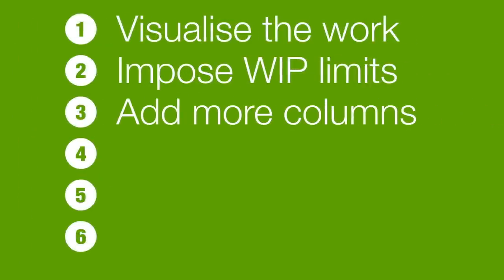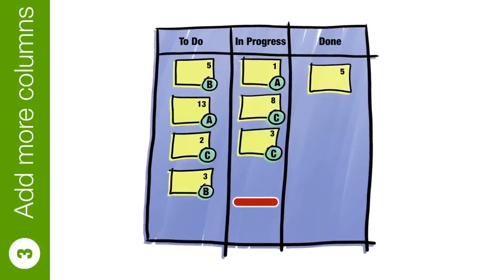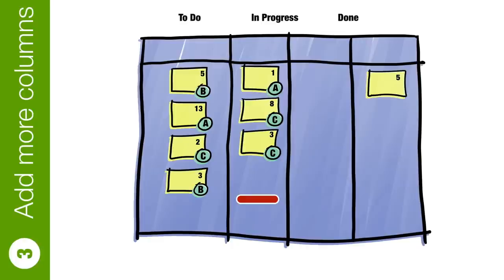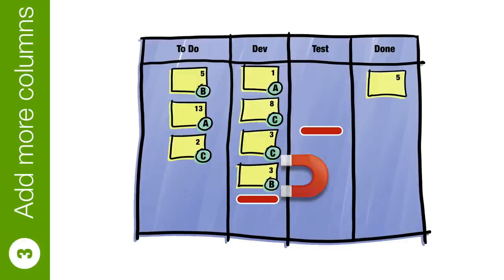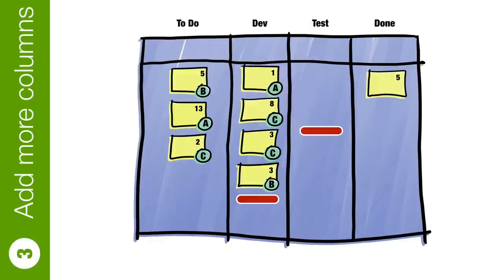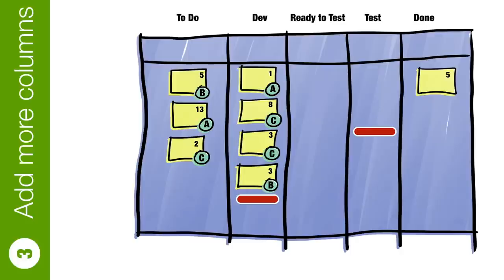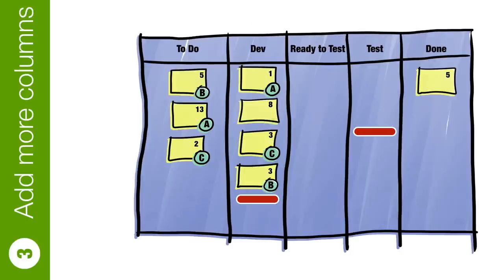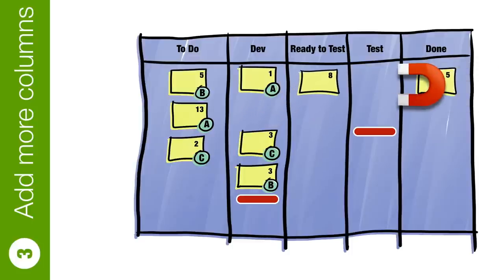Step number three: add more columns. Step one was about visualizing workflows, and that simple board was not a bad start — but for most teams the workflow is a little more involved. Let's replace 'in progress' with a column for development and a column for testing, each with their own work-in-progress limits. Dev pulls from to-do, and test pulls from dev — but as things stand, dev is pushing into test. Let's fix that by introducing a buffer between the two. Now we have a place for developers to put finished cards, and test is empowered to pull tickets in when ready.